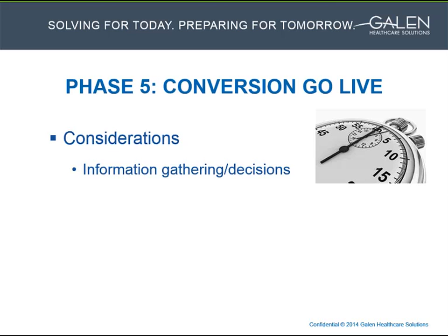We needed to make them aware of how they would be seeing results data in the patient's chart. Another example of this was with active problems in past medical history in the legacy EHR not clearly designated as to which status they were, active or past medical, depending on how they were entered. So again, through the conversion testing, we discovered this, and it gave the appearance in the target EHR of these problems being all mixed together, and there really was no way around that in the conversion of the data, so it became a training issue, something that we need to bring forth to the participants in the go-live and the support afterward.